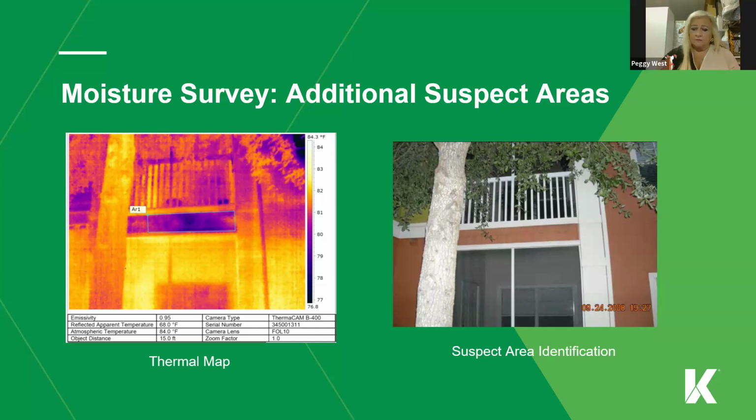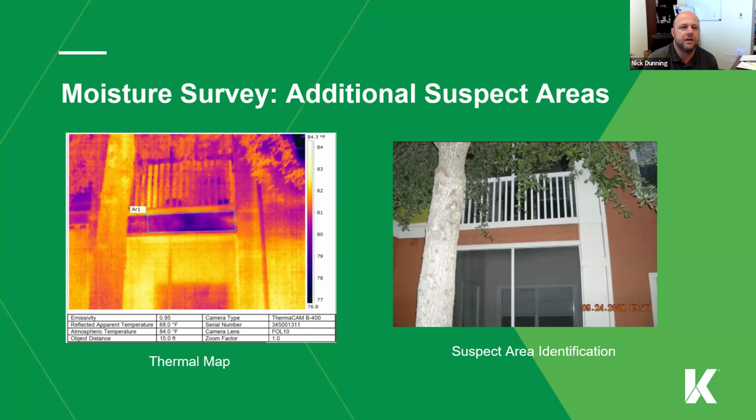What's your recommendation? So keep in mind that the milestone inspection is a mandate. It's law now in Florida, and that is for the structure. Yes, you will be looking at the painting because the painting protects the structure, but we're looking really for the structure elements. That's why I believe, and Nick, you can correct me if I'm wrong, if the law changed, because there were a lot of changes going on. It was 10 years, if I remember correctly, to do the milestone. Yeah, and the SIRS is the same.